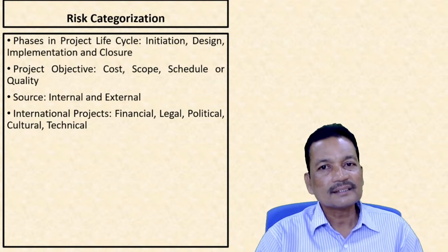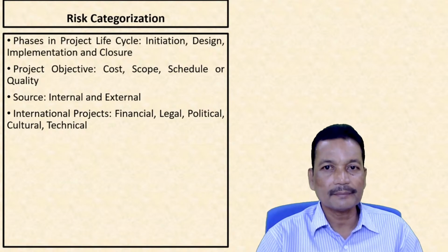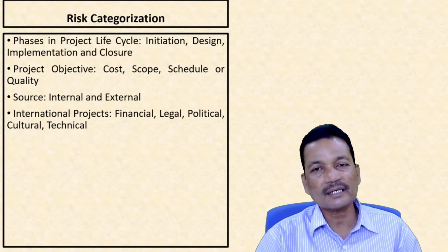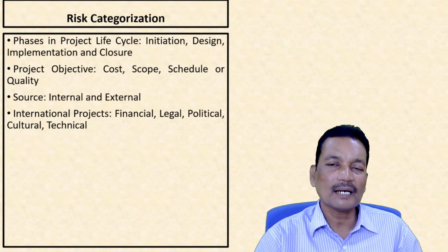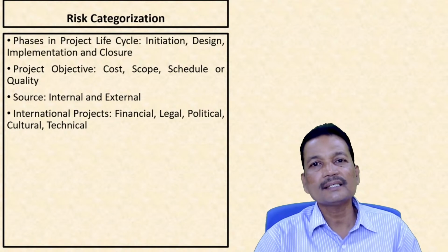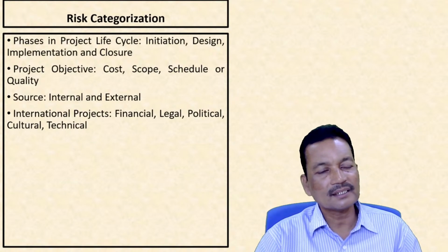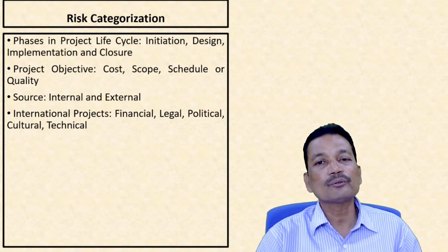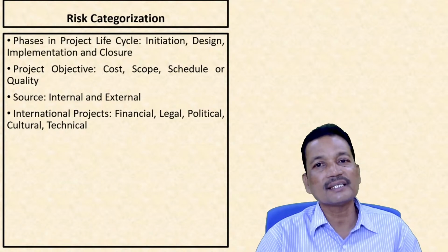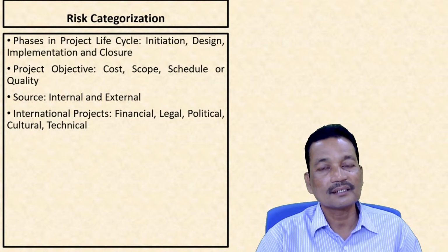Then risks in international projects, that means projects which are done offshore. Suppose we are a project organization set up in India, and we have taken up a project to be done in another nation. So that becomes an international project. There the risks can be of a financial nature. That means due to foreign currency exchange rates, we may have financial risk, legal risk.